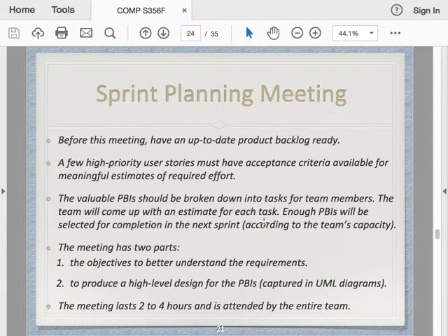But if a task requires 3 months of effort, then by the time it's finished, we're already at Christmas. So you want to manage the task size to be roughly half a week or 1 week if you're doing it part-time. With a full-time employee, I would suggest keeping a task within 3 or 4 person days would be about right. Don't make it too big, it would not be very useful, but too small and it's too tedious, too much trouble to keep track of them.